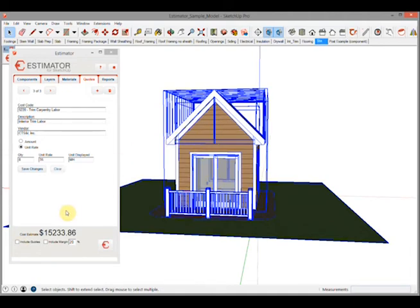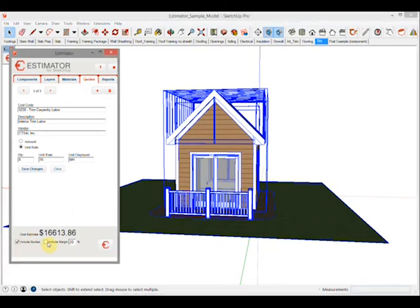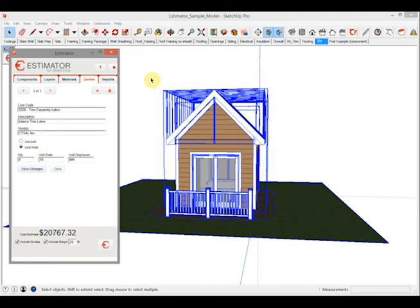So when you're done at the end of the job you can include the quotes, you can include your margin which is a percentage of the total cost of the project, and run your report. It's as simple as that. So that's quotes, thank you.